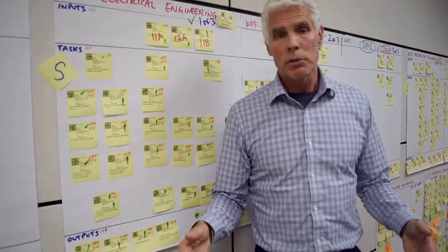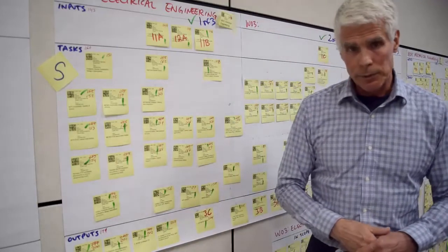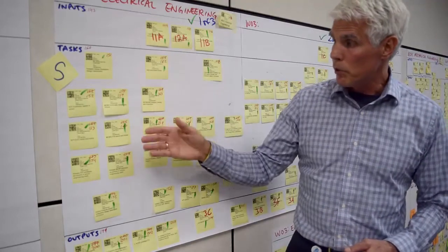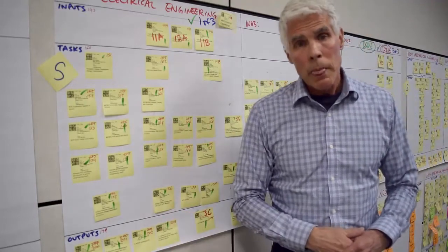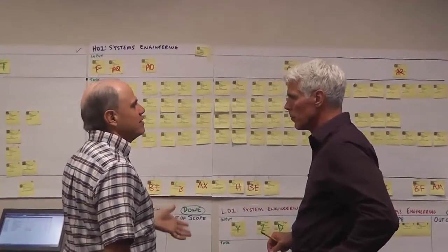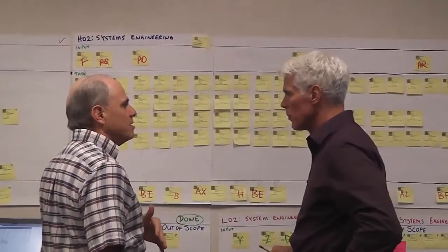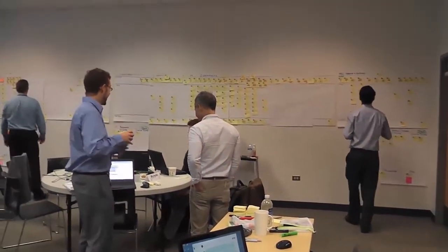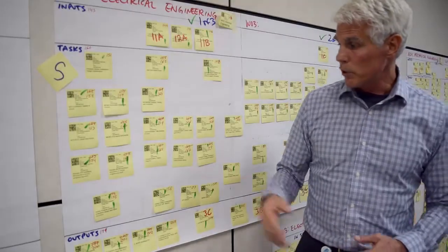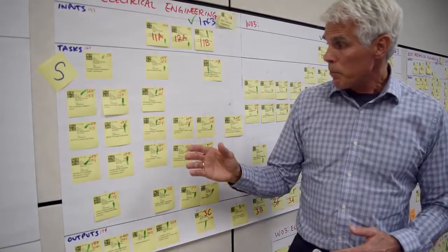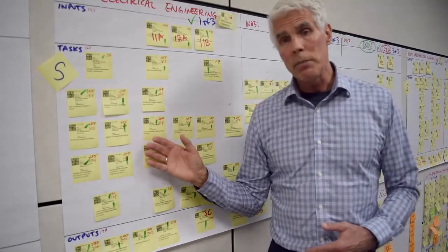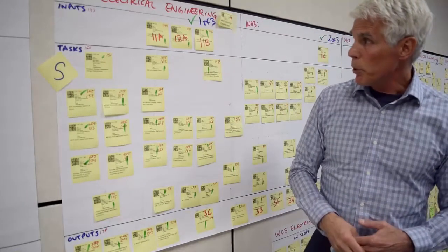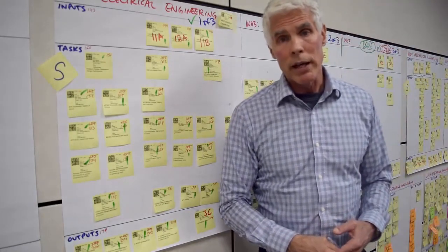After we define workstream scope, the next step is to build a schedule. Schedule has 3 primary elements: inputs, tasks, and outputs. What we want to do is make sure that the creation of these outputs will accomplish all the scope that we agreed upon for this work stream. One important part of the schedule development process is to identify the things this team needs from other work streams. We use inputs and interdependency mapping to do that.